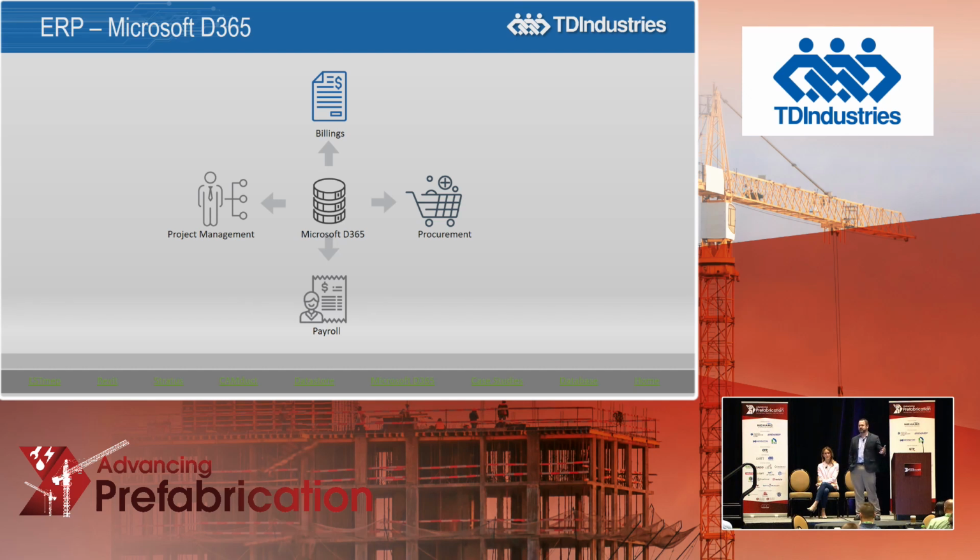So 6-inch weld band, what's the ID of that fitting? What is the Ferguson ID of that fitting? What is the Morrison ID of that fitting? So as we create the bill of material for that package, we can go directly to the vendor with their codes and get an exact pricing on those items based on our purchase agreements. So we're also storing all of our purchase agreements. So we're making sure that we're actually paying for the item what we agreed to pay for the item, okay? So there's a very direct connection between all of the pre-con, VDC, shop data flow through those IDs, okay?